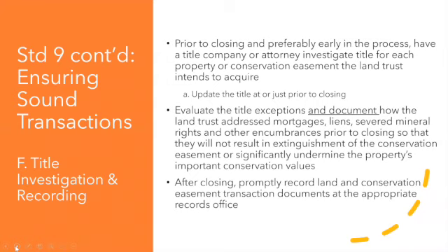For all transactions, conservation easements, and fee properties, a title investigation is one of the most important components of due diligence. And there's several reasons why it is a good idea to begin title investigation as early as possible in planning the project. First, you'll want to make sure that the prospective donor or seller, whomever it is that intends to convey the property to you, is in fact the legal owner of record. Believe it or not, transactions have in the past been negotiated and even completed with closings with parties who had no right to convey the property.